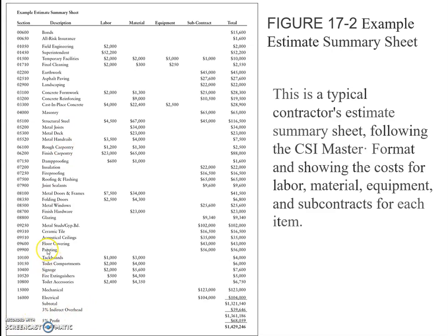So a lump sum item like floor covering in the estimate may be divided into a proportionate amount for each item. The subcontractors would be asked to divide the bid into two items. Contractors often estimate the percentage of each item based on unit price and quantity to determine this division.